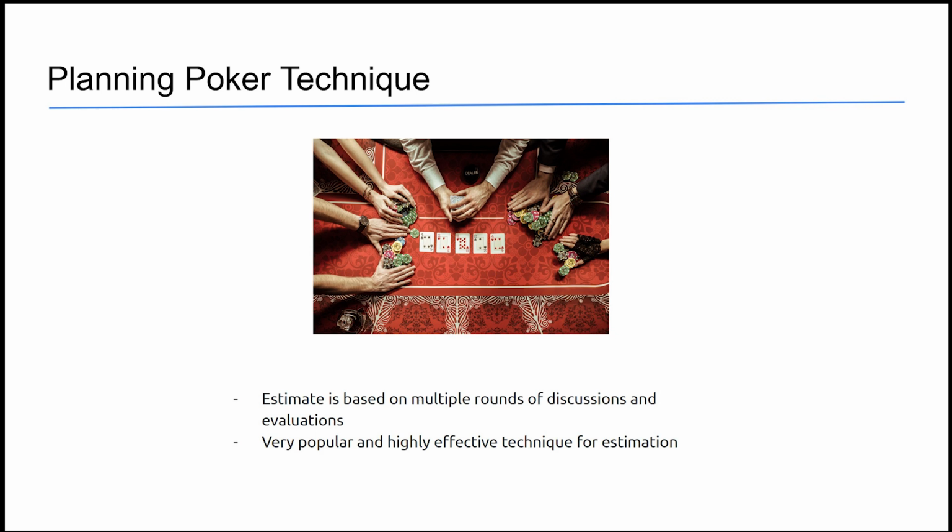This is a very popular and quite effective technique to define an estimate. Multiple people provide their estimate for work independently in multiple rounds. In the first round, there can be a major deviation between values from multiple team members. The members that have estimates very different from others should explain the reason why they provided an estimate with such deviation. After that, discussion can be held where team members discuss whether those explanations are reasonable or relevant. Follow-up rounds will be held to account for thoughts and discussions. After multiple rounds, estimate values usually get balanced to a median.